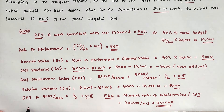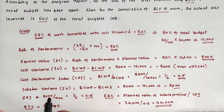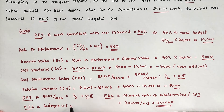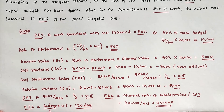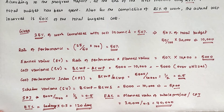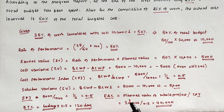Next is the Estimated Time to Complete. We planned for 60 days, but since the Schedule Performance Index (SPI) is 0.5, the estimated time becomes 60 divided by 0.5 = 120 days. Even though we planned for 60 days, it will take 120 days because of poor work performance. From this, we can easily track the project and calculate its performance.